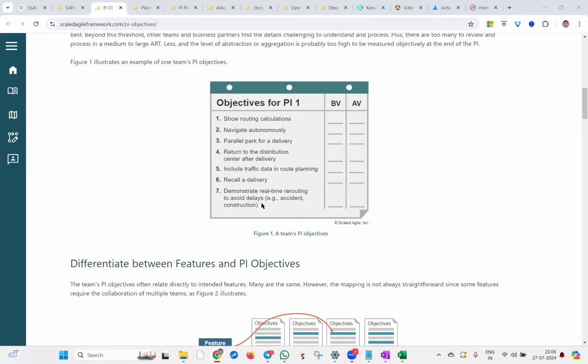But what if some team is dependent on this particular thing? Then it is to be raised as a risk: if you are not completing it, some other team might get impacted. Yes. So now, as a management team, you discuss in the management review how you can provide help or guidance or whatever it is for us to achieve this.